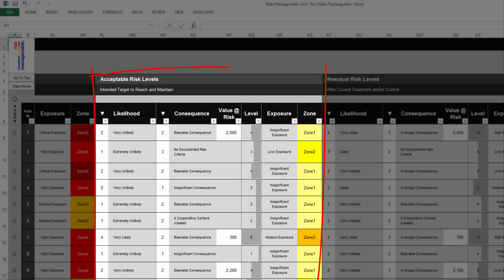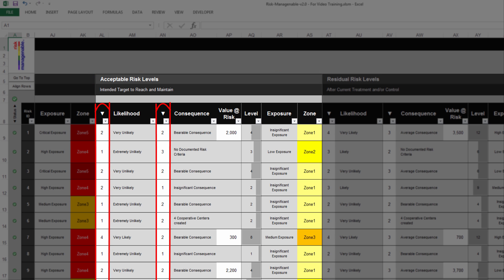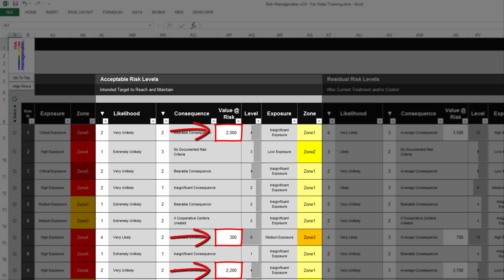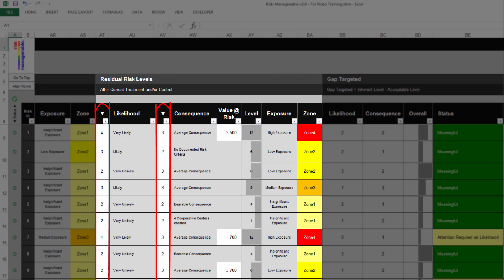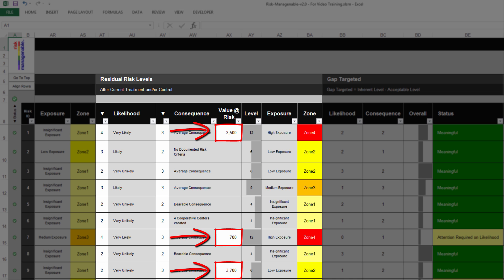The section Acceptable Risk Levels is where you record the Likelihood and Consequence levels intended as the target to reach and maintain for the risk. You simply select the Acceptable Levels from 1 to 5, just as you do for Inherent Risk Levels. For risks where a Quantitative Value is needed, you also enter an Acceptable Value at Risk. All other columns are automatically filled up with key information. The section Residual Risk Levels is where you record the Likelihood and Consequence levels after the current treatment or control is applied. You select residual levels from 1 to 5, and for quantitative risks, you enter a Residual Value at Risk.